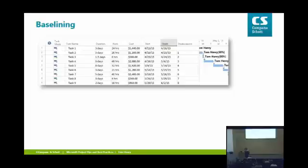Yeah? So what if you have a resource that will work 5 days a week and you have a resource that will work 4 days a week? Do you have individual resource calendars? Correct, yeah. So you could set up for each person their own calendar. Now if you're using an enterprise tool such as Project Server or Project Online, I don't know if you've heard of those tools, I can talk to you later about those if you like. But you can specify an enterprise level, and that can be set up in Active Directory, somebody's working calendar. You know, they only work Monday through Thursday, they take Fridays off. Maybe they work part-time, whatever the case may be. That can all feed down. But if you haven't got that kind of solution, you can set up a resource and specify the calendar for each resource and do it like that.